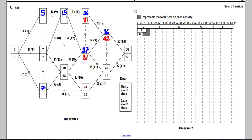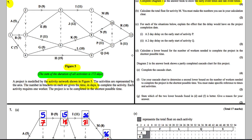How could we get to the next node? It's either 18 take away 0 = 18, or 31 take away 12 = 19, or 31 take away 11 = 20. The smallest is 18. Then it's either 28 take away 19 = 9, or 18 take away 5 = 13, so we go for 9. And 18 take away 11 gives 7, which is clearly smaller than 9, so that's 7. We've completed the forwards and backwards pass for part A — four marks.